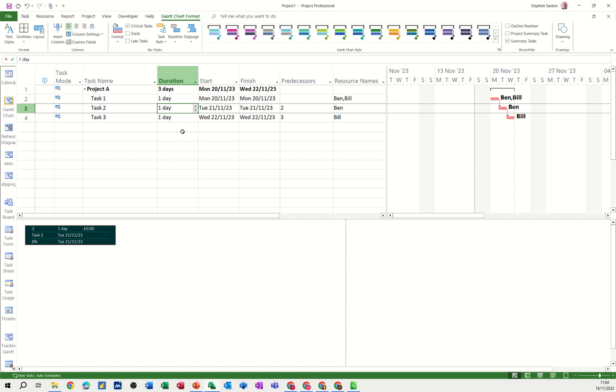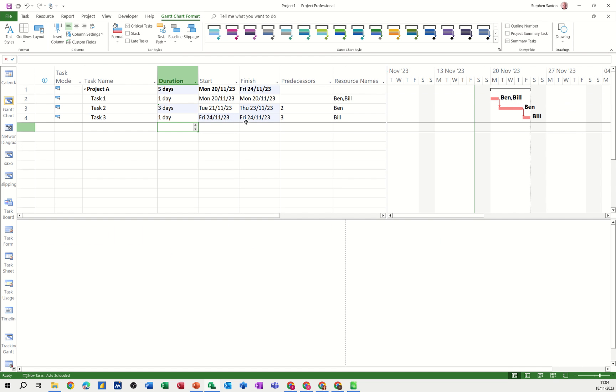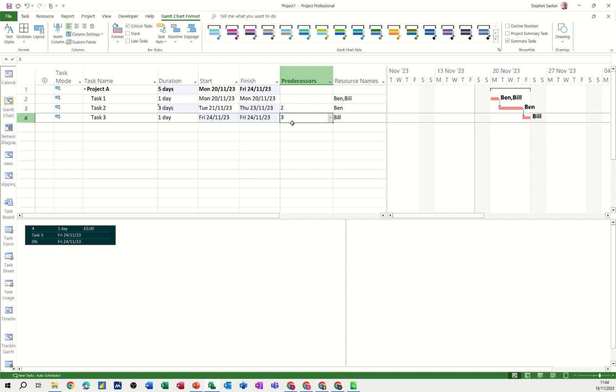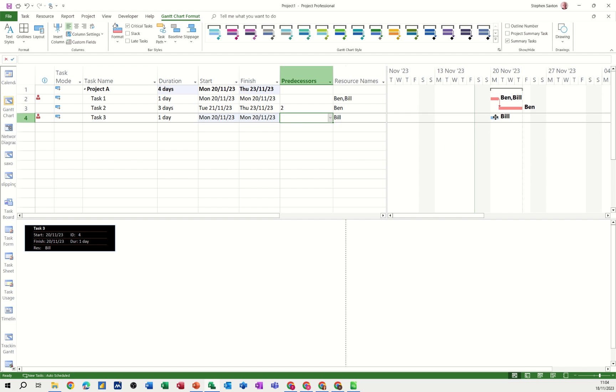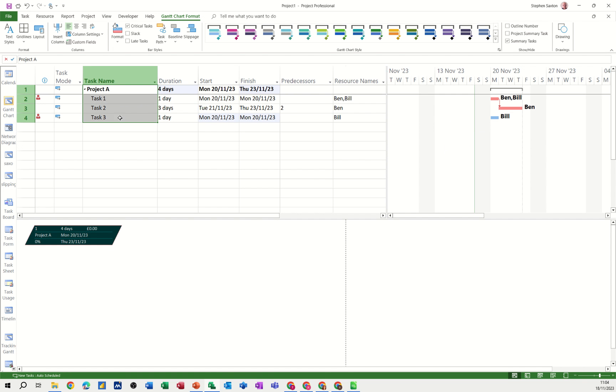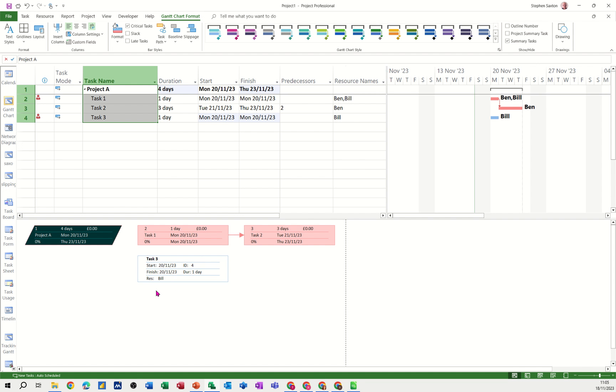But if I make one of these not critical, so if I say that one is three days and just break that link, there's no link there. Now, Bill is doing that task and because it's not linked, it's gone blue, which means it's not critical. Don't worry about the over allocation. You can see what's happened there.